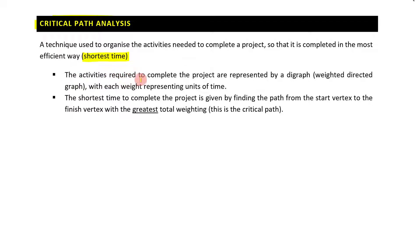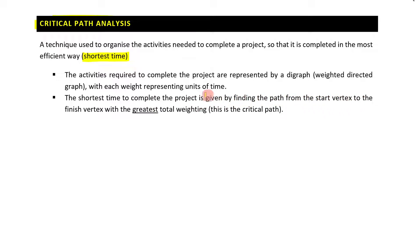The activities required to complete the project are represented by a digraph — a weighted directed graph — with each weight representing units of time. The shortest time to complete the project is given by finding the path from the start vertex to the finish vertex with the greatest total weighting. This is the critical path.